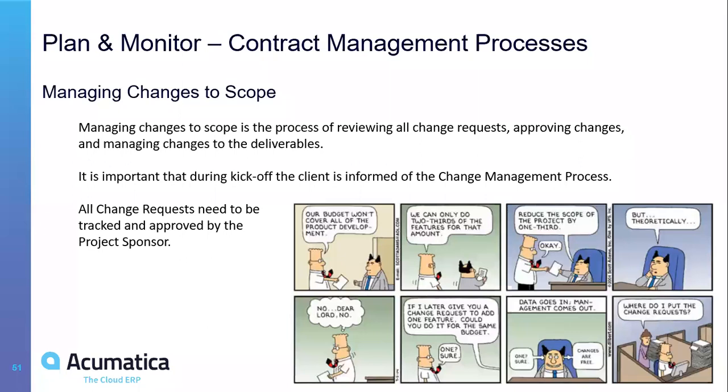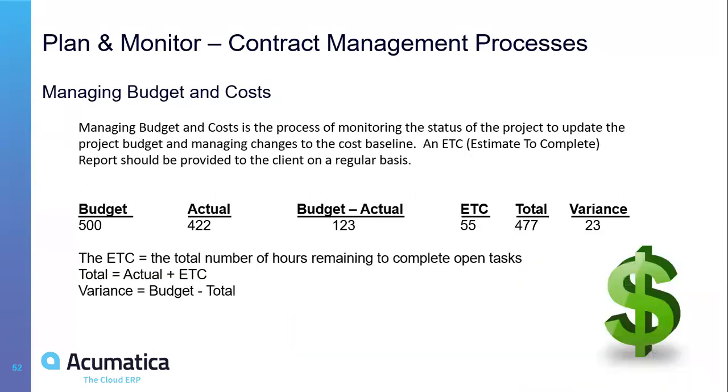Believe me, we have this relatively regularly. And when we look into detail, it's always both sides. And part of it is they didn't sign off the design document, they didn't send you the data for the data migration, master data in time. So document this. And the best way to document this is in the change request document that is signed by both parties.